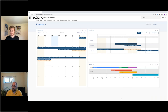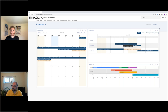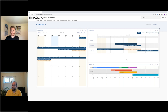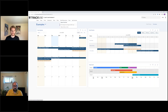I can do the same thing for roof — set it to depend on walls — and now everything stretches out together. When anything changes, we can use that to generate notifications or update someone's dashboard queue. I also set up conditional formatting rules so that items waiting on a dependency change color on the timeline, which is especially useful for a project manager looking at several projects intermingled in one calendar.